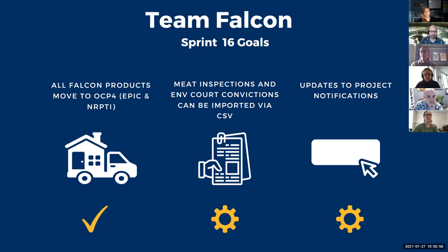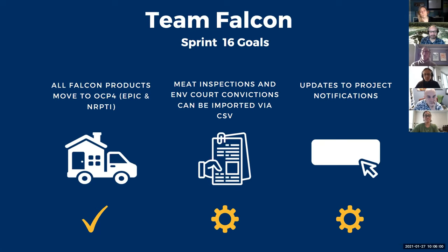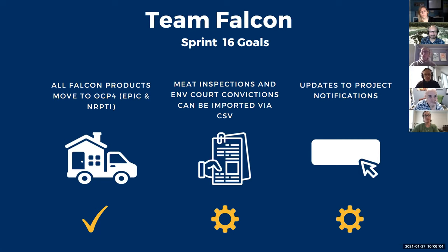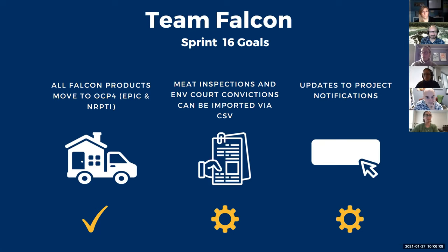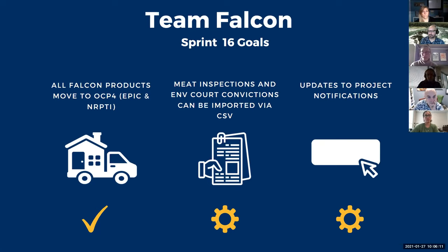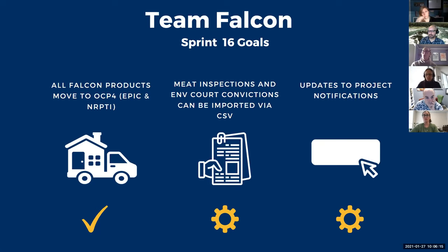We also wanted to get the meat inspections from the Ministry of Agriculture and the Ministry of Environment court convictions to be imported via CSV into NRPTI for NERCID. We've got the meat inspections in there. And I know the court convictions is in progress right now. And I think close to being finished. So that one is still in progress, but mostly done.